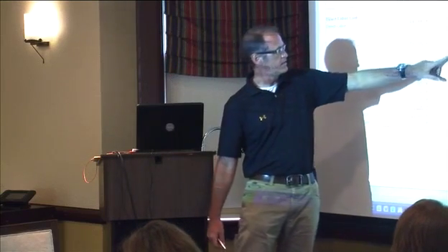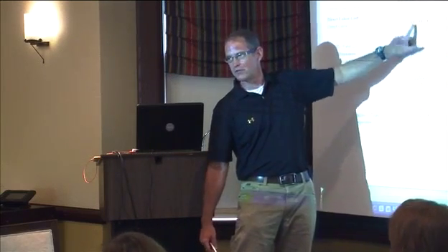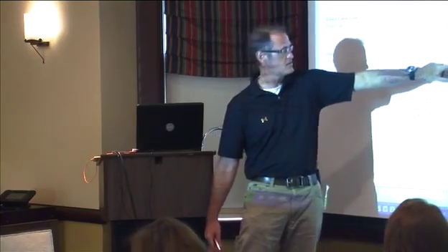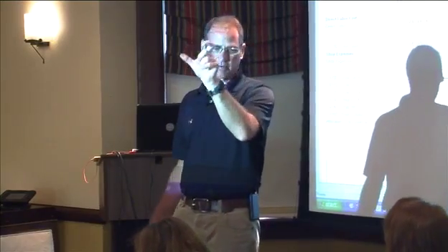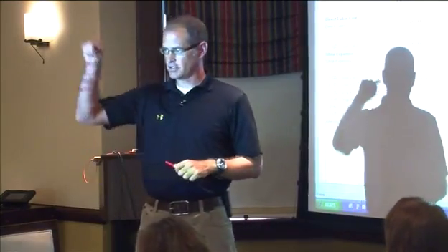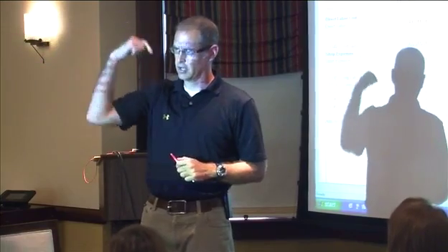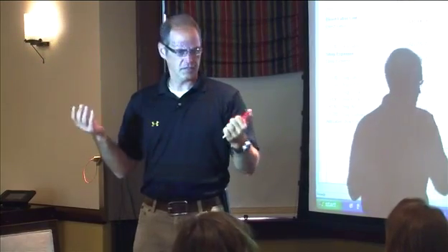Very simple equation here that takes that $251,000, divides it by my total labor costs, and this 17.9% is that amount that I'm going to tag to every labor dollar. Every labor dollar that I cost in my job costing is going to go in and cost 17.9%.